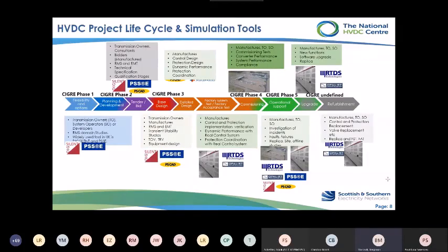Now, the important point is that's just describing the HVDC side. A similar set of requirements exist for your turbines, for any STATCOMs that are involved in your connection, and you've got essentially multiple devices going through the sequence at multiple times with a different data resource available to them. At certain points, there will be more information, for example, on the characteristics of the cables. The Seagray and Senelec processes describe 5 phases, which I've mapped onto this. But as you can see, there's not a perfect mapping.